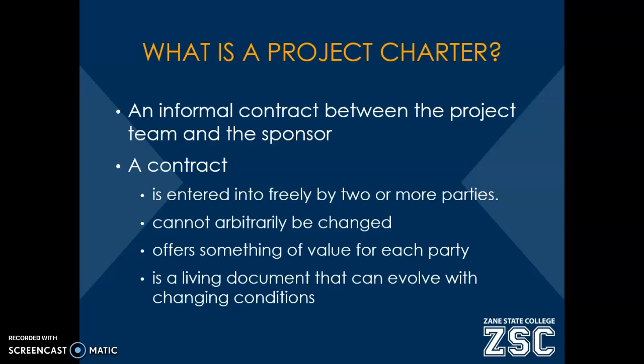It should be beneficial to all the parties involved. It should provide value to everyone in some way. And it can change. It is a living document that may change throughout the project, but it can't be changed arbitrarily. So there's a formal process. Everyone has to agree to the changes that are made, and so then that way it can be updated as required by the project.